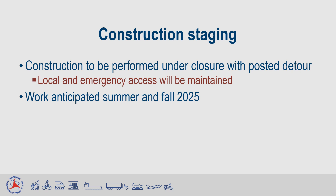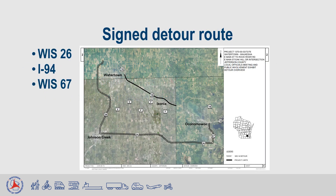Construction is anticipated in summer and fall of 2025. Construction will be performed under a road closure with posted detour. Provisions will be included in the contract stipulating the contractor has to maintain local and emergency access at all times. The posted detour, as depicted on this slide, will follow along Wisconsin 26, I-94, and Wisconsin 67.